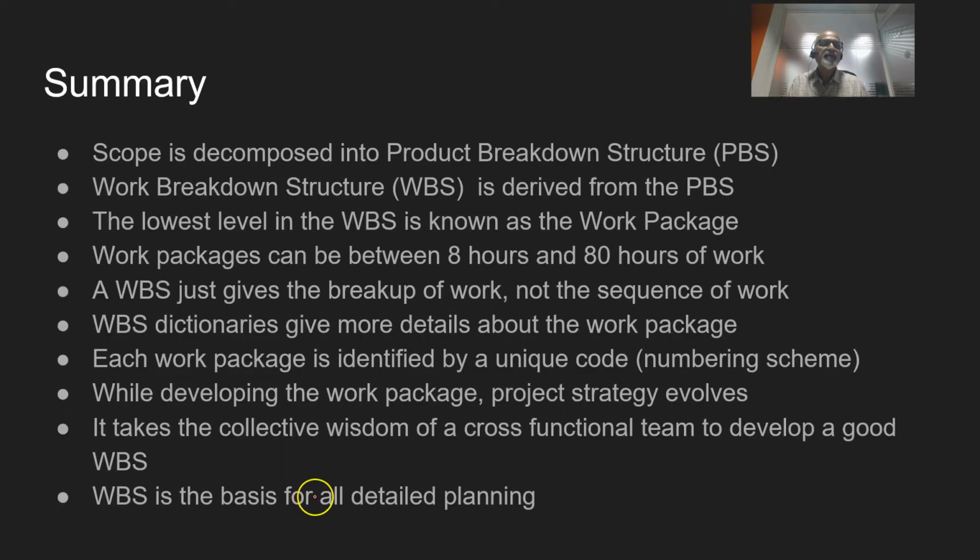To summarize the things we discussed, the first step is the scope is decomposed into a product breakdown structure. It is also known as a PBS. Then a work breakdown structure is derived from the product breakdown structure by superimposing it with the engineering activities required and the project management activities required. Then we arrive at the work breakdown structure. The lowest level in the WBS is known as the work package, and work packages can be between 8 hours and 80 hours of work. We call it the 8/80 rule.